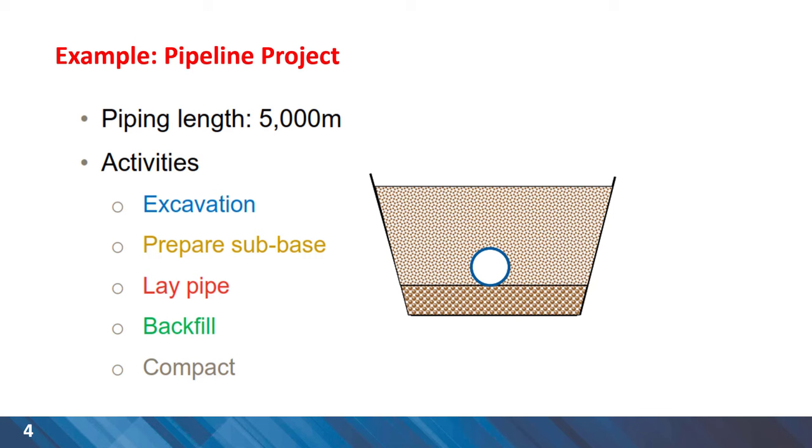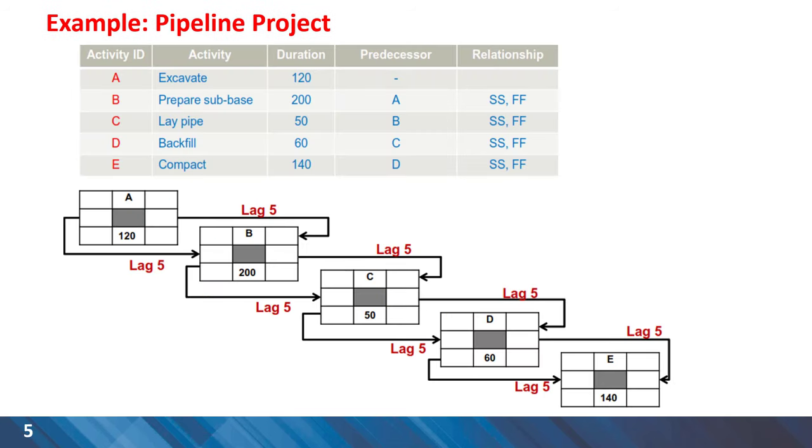One solution that comes to mind is considering a CPM such as this where start-to-start, finish-to-finish relationships for all activities have been implemented with a lag of 5. Let's complete this CPM and see how the schedule will look like.